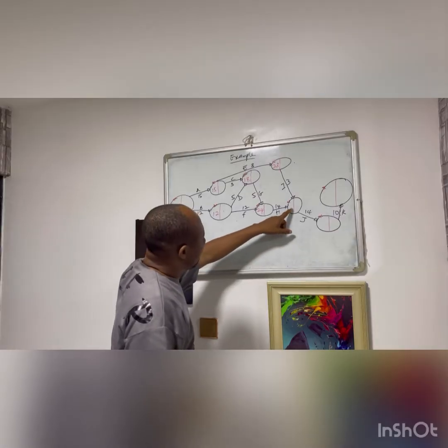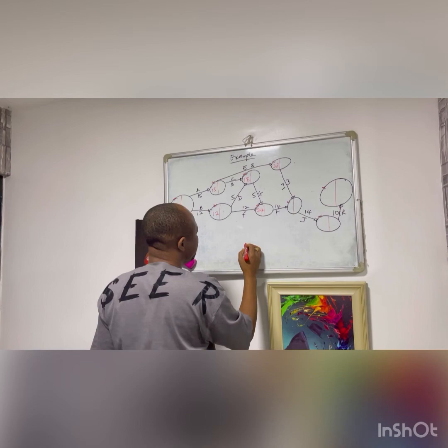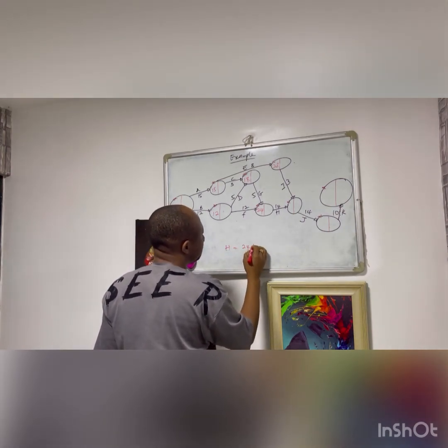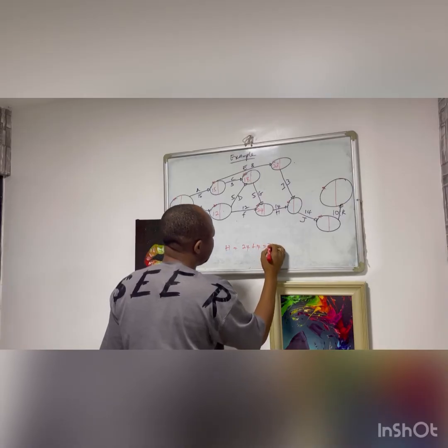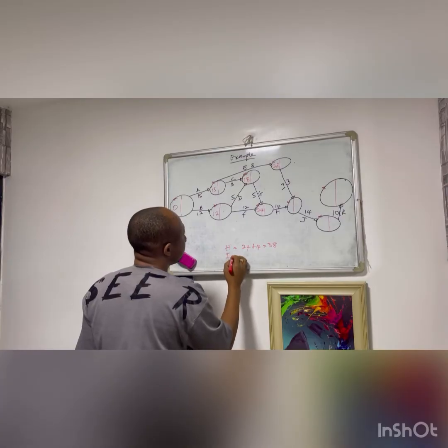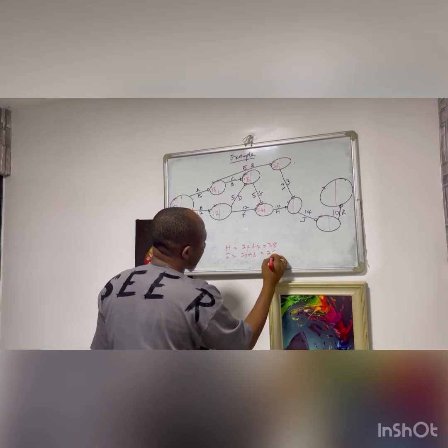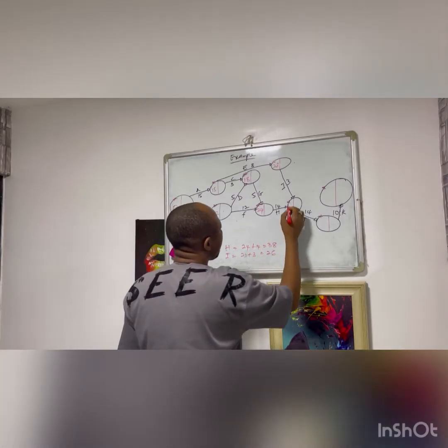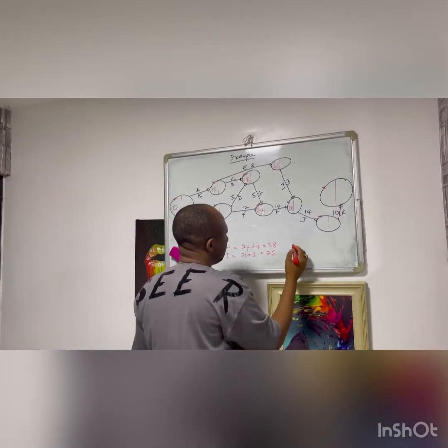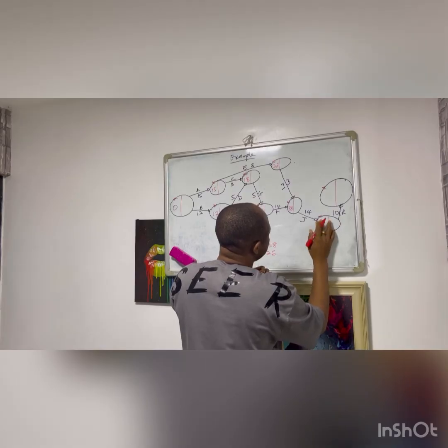So this one too has 2 arrows arriving here. The first one being activity H. Activity H will start in week 24 and use 14 weeks. So activity H will arrive in week 38, while activity I will start on week 23 and use 3 weeks. Activity I will arrive in week 26. So I take the highest of the two, which is 38. Only one arrow comes here, which is 38 plus 14, that's 52.